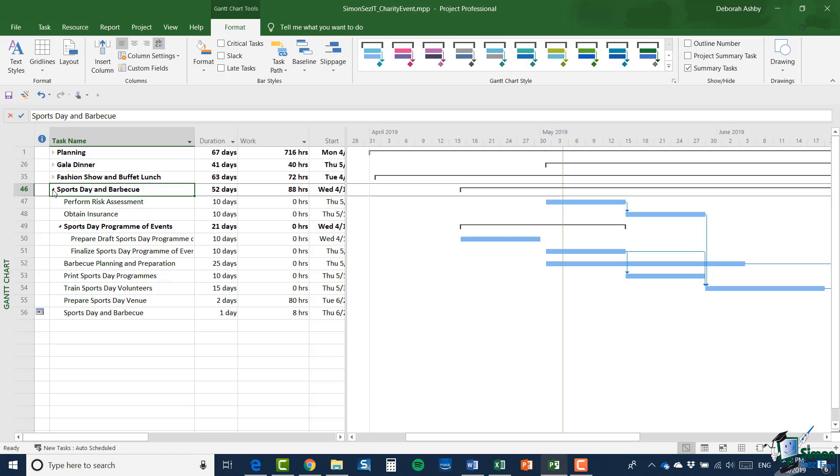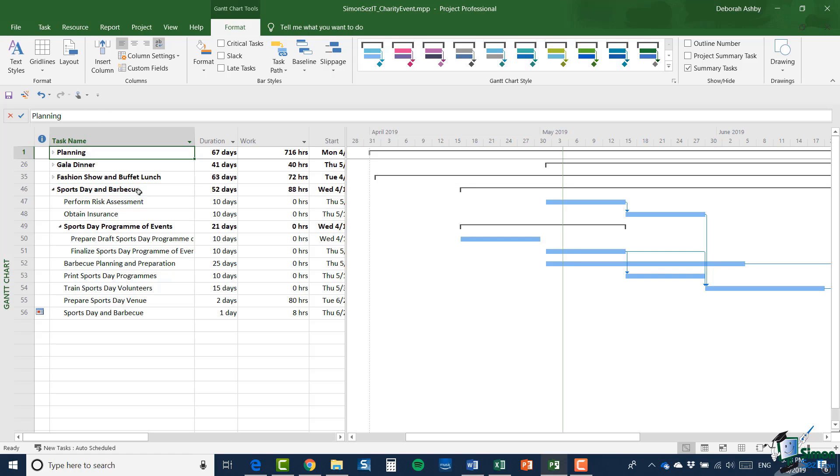Now, let me point out a couple of things before we start. First of all, if you're going to split a program of work into a number of separate projects, it's a good idea to make that decision as early on as possible, because if you've already set the program up as a single MPP file, there will be quite a bit of work to do in splitting it up again. I'm going to show you one or two options for splitting as we go through the next few sections. And as you'll see, there's very often quite a bit of work to do.